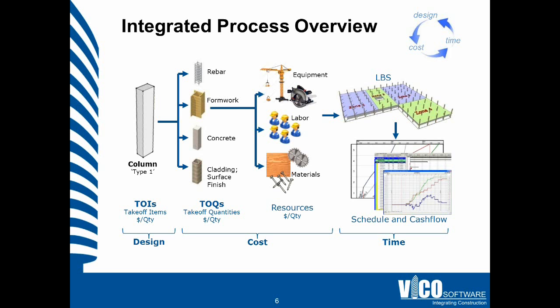The beauty of building information models is that each of the elements contributing to the quantities has a location — an X, Y, and Z coordinate — and we use that information to define a LBS, location breakdown structure. Using that, we know how many columns there are in zone 1, zone 2, zone 3, zone 4, and so on. The locations can be defined as granular as needed from a scheduling point of view. That integrated information — quantities per location with their cost — can then be fed into a schedule, which can also be used to print a cash flow curve, as you can see here. All of that is integrated and derived directly from the 5D data set.